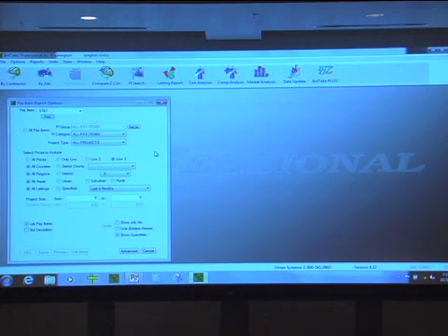Or if I have had a spec change that I know is affecting my bid item, and the contractors might be a little confused, I'll go out here and pull all my contractors' bids. So everybody who bid on that job in the last 6 months, then I'll look for groupings of like cost. And I will know that that's probably a better idea of what that item should be costing.